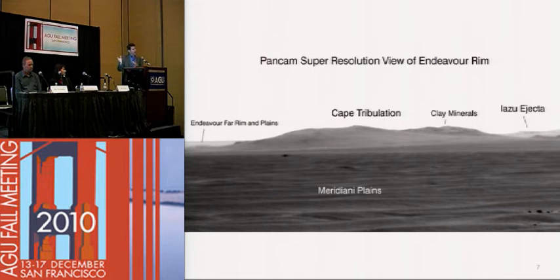So we're at the crater right now, Santa Maria. We'll be exploring, doing a survey of the crater. We'll be positioning for solar conjunction. Starting in late January and extending through to early February, the sun will be pretty much within the line between Earth and Mars, and this limits communication to the rovers, particularly commanding of the rover. So what we intend to do during that 2 to 3 week period is position the rover in one of these very exciting putative hydrate areas, put the robotic arm down on a surface target, likely the Mossbauer spectrometer, to do a long integration and leave the rover there pretty much unattended for 2 or 3 weeks.